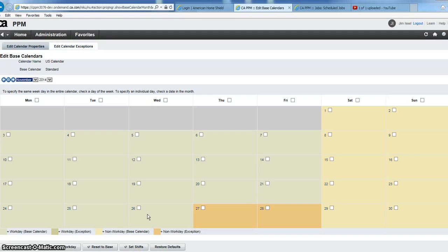So at 50%, you would see them at 12 hours allocated for the week, because Clarity knows those 2 days are non-work days. So you can update an individual's calendar to add their non-work days, but you start with a base calendar that has holidays for that region. And then by putting in their personal days off, you have a very complete picture of this user's availability. And Clarity uses that when computing allocations based on percentages.